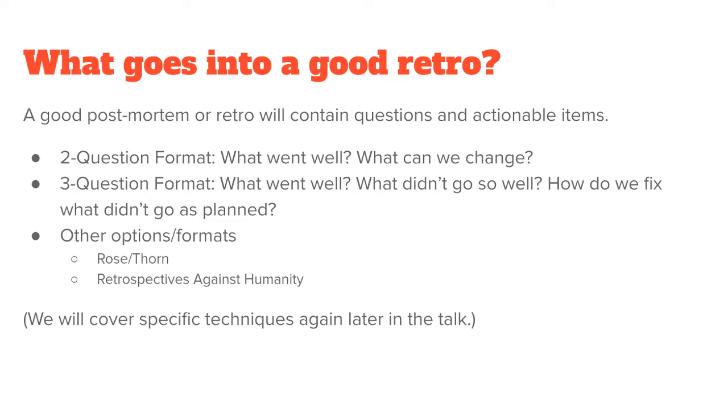And I wanted to add a thought. If you're in a 2-week scrum, at the midpoint this doesn't make a lot of sense to do. But if you're in a waterfall environment or you're working on a 2-month project, use this at your midpoint, right? You don't have to wait till the end. You don't have to wait till it's all packed up and sent off. Do it in the middle, especially if you get that sense like, this is not going as well as I thought it would. Then take a minute, step back. What can I change? We still have a month to go.